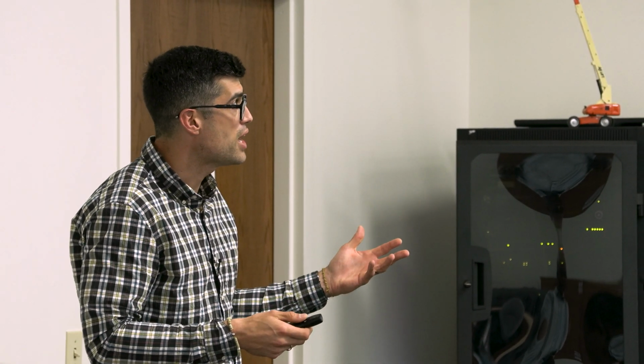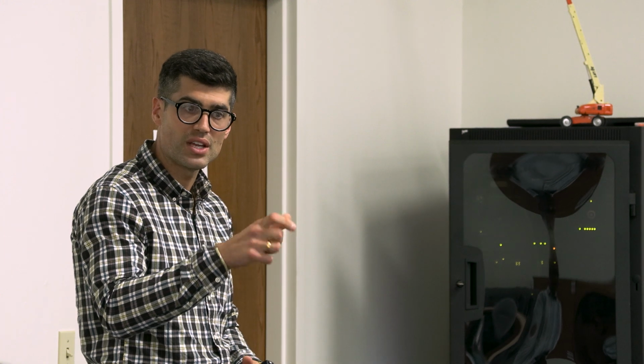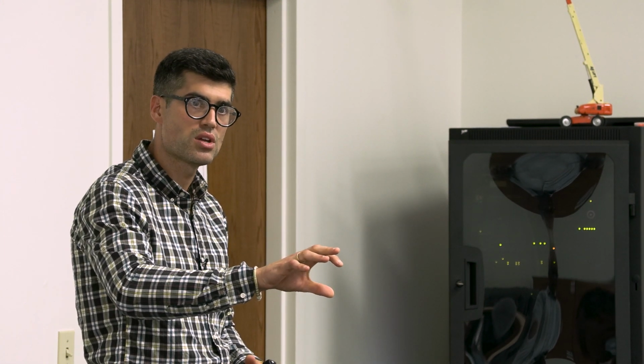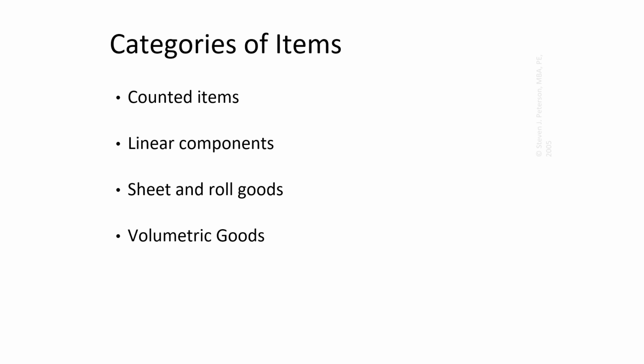We can break it down by location, installation schedule. You can look at work packages differently from how you assign it to subcontractors. They're unique, but I also need to be able to extract data really fast for meeting sake too. We break it out a couple ways. Counted items, right? So again, I will spot check these types of things. Examples of counted items: lighting trays, diffusers, right? Scutcheon plates.